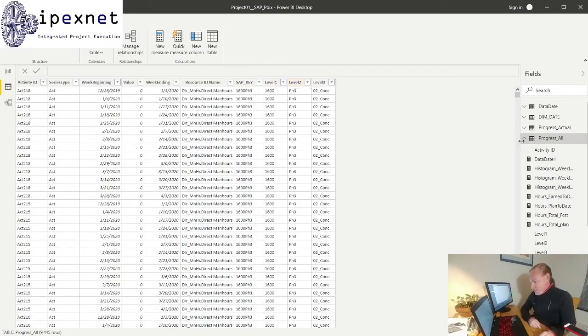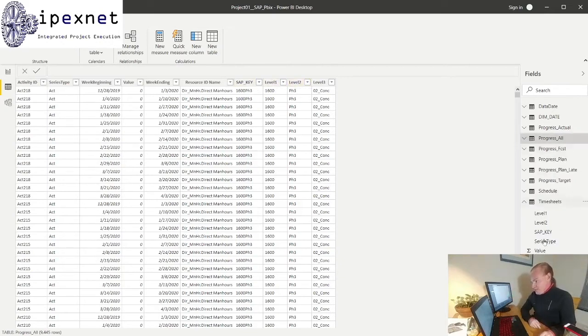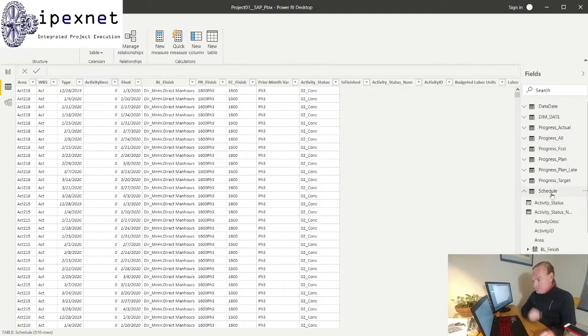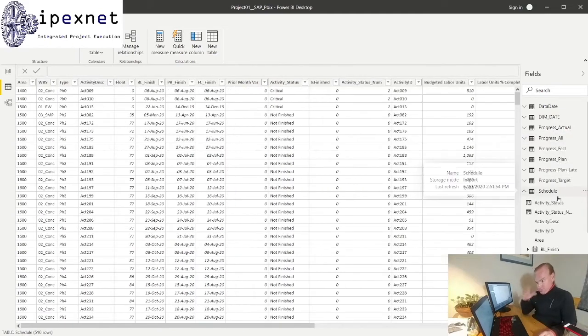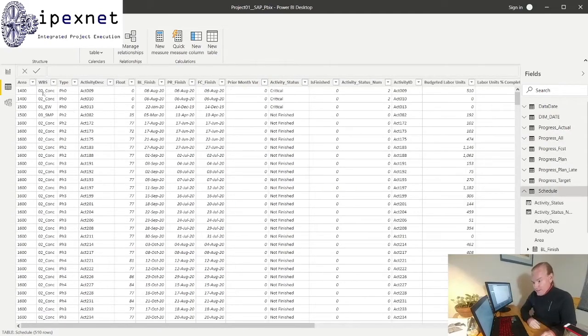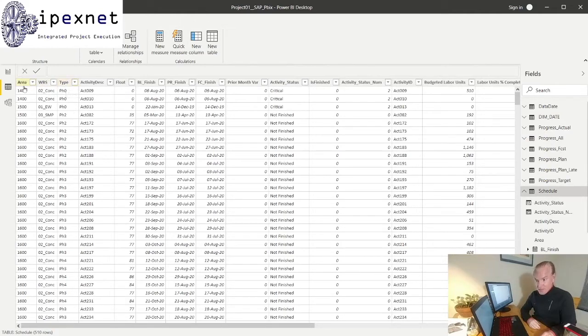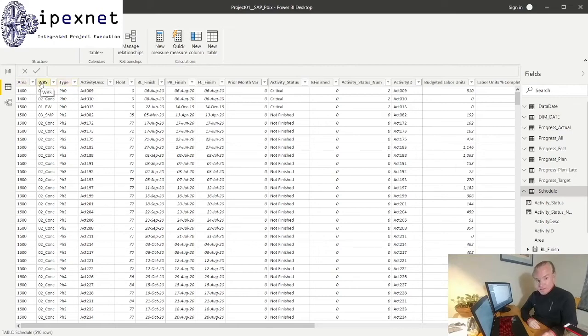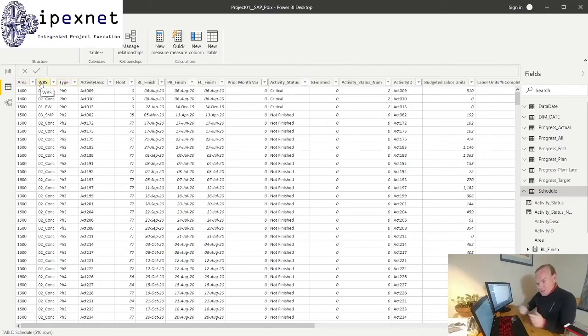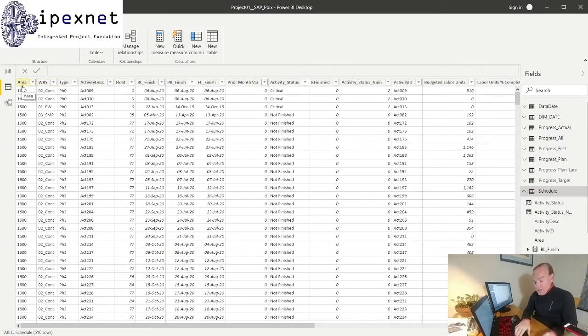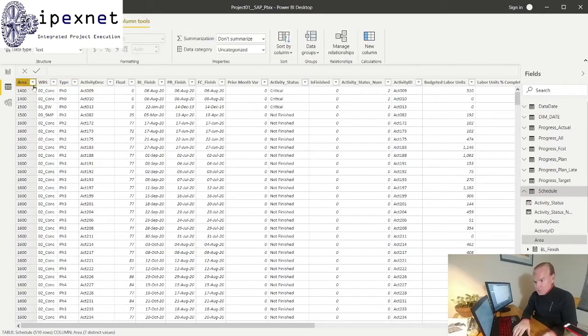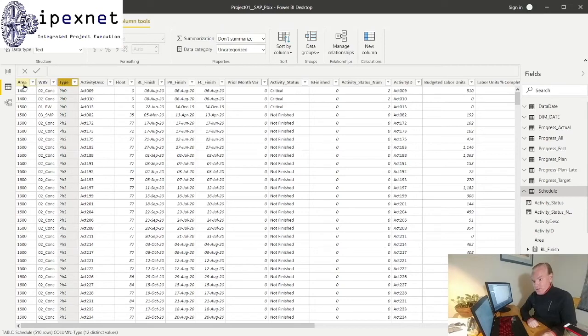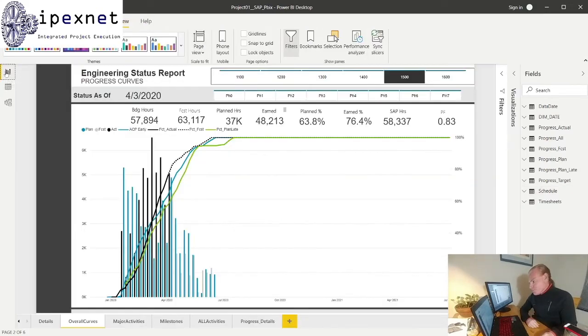In this example I've not done it on my schedule, but in the exact same way - here it's just called something different, it's called area WBS type - but you can actually see this is the level one, that's the level two, that's the level three. So if I actually did want to link my timesheet into my schedule, it would actually be in this case a merge of those two, and then you can bring them together.